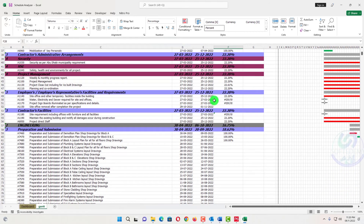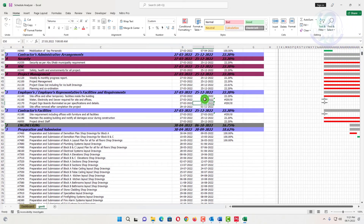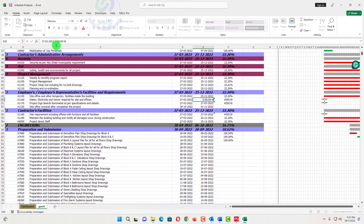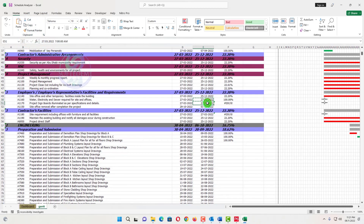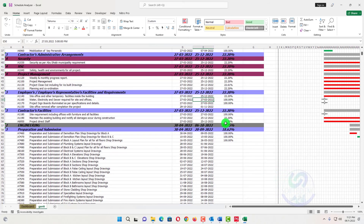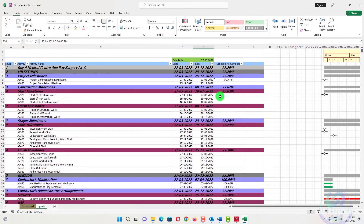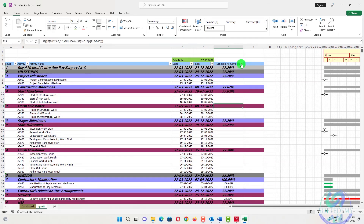If you have the same start and finish date, there will be a division error because the denominator becomes zero. To fix this, you can change the finish to 5 PM instead of 7 AM — for example change it to 28 or adjust the time to 5 PM. When I change it to 5 PM, the value updates and the error is resolved, because work starts in the morning and finishes in the evening. Values of 100% appear correctly for completed milestones.